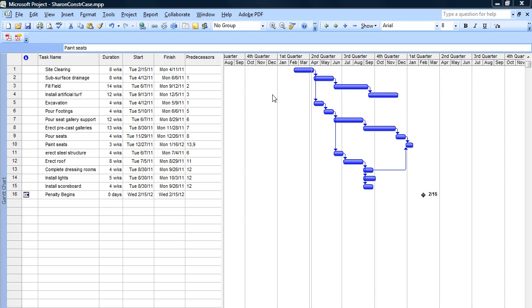I have this sample project up right now. It only has 15 activities and it revolves around the building of a sports arena or a stadium. If I'm looking for milestones, I see the set of four activities here, these four that all have to do with creating the field: site clearing, subsurface drainage, fill the field, and then install the artificial turf.